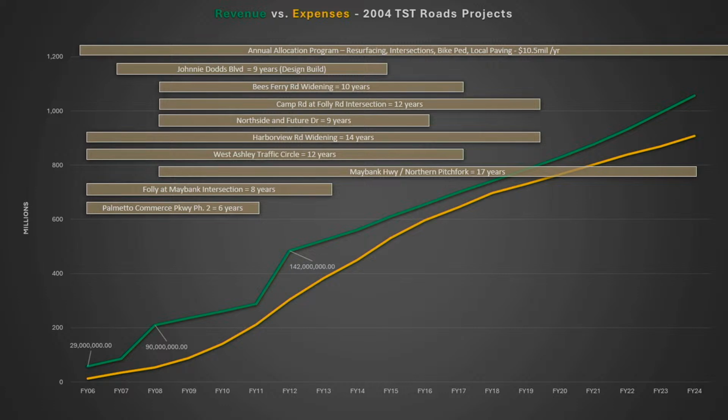Our yellow expenditures cannot exceed that green line. So this is a constant thing that we're having to monitor and evaluate. As our bids come in, we don't really know what a project is going to cost until we see what the bids are when they come in. That's the true cost, right? What someone is going to charge you to actually build that project. And you can see even in FY 17-18, we got a little tight there on our cash flow, right? So it's a constant management.